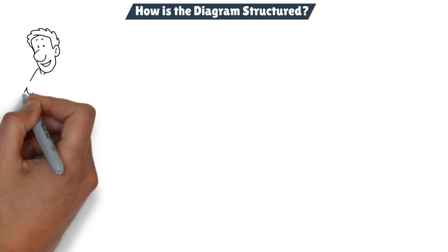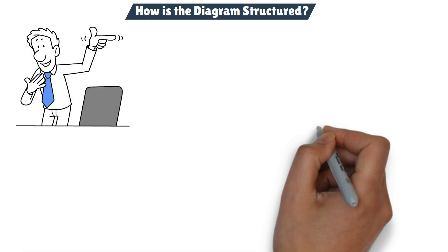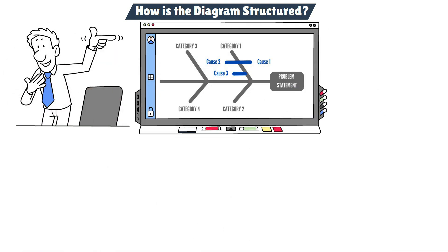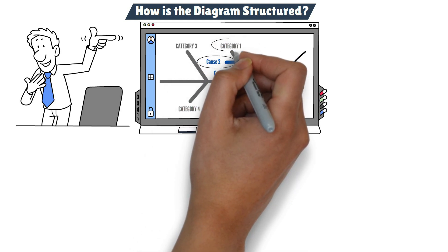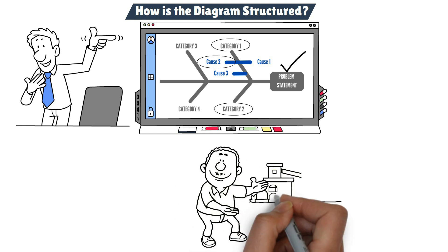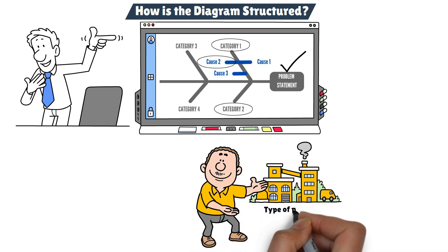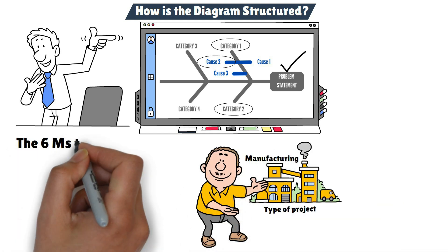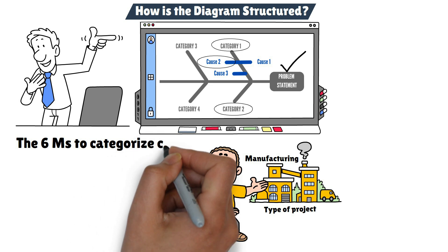Let's break down the structure of the Ishikawa diagram. The problem is written at the head of the fish, and the main causes branch off the spine. These causes are grouped into categories which are tailored to the type of project you're dealing with. For instance, in manufacturing-related projects, you might use the six M's to categorize causes.